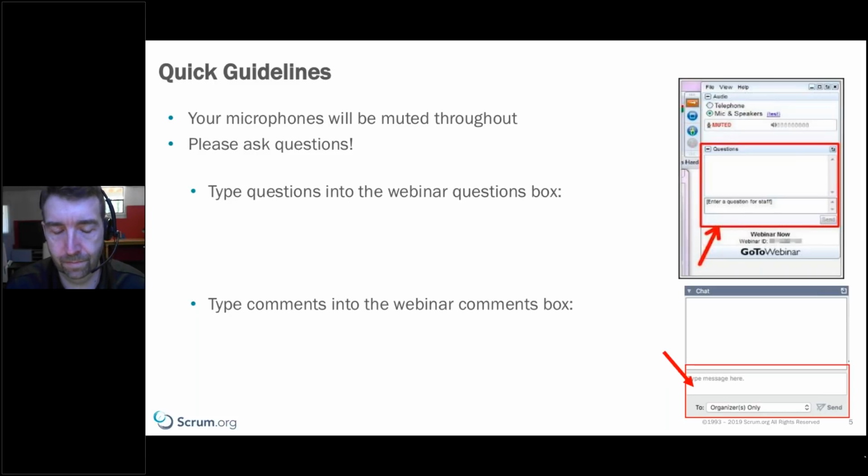Great, thanks, Russell. So another question. We're doing review, then retro, then sprint planning on one afternoon for a 2-week sprint. What's the best order that you see? Actually, there's a myth in this question. It says retro, review, then planning, as the Scrum Guide says, or review, then planning, then retro, because we can discuss in the retro impediments and other things ahead of planning. Just to be clear, the reason the Scrum Guide has planning listed first is because planning kicks off the sprint. Once you start planning, you're now planning your sprint. You're in the sprint. Where review and retro, those are about the previous sprint.